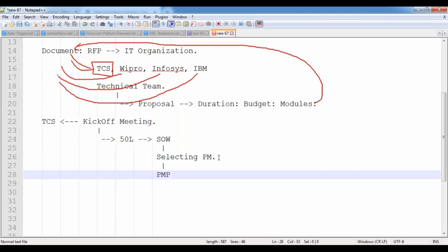He is preparing a complete plan of the project execution. So in this case, in the PMB document, clearly he is indicating what software licenses we need, what hardware licenses we need, what tools licenses we need, how many team members are required, how many will be developers, how many will be administrators, how many will be testers. Everything he is going to be defining inside this project management plan itself.